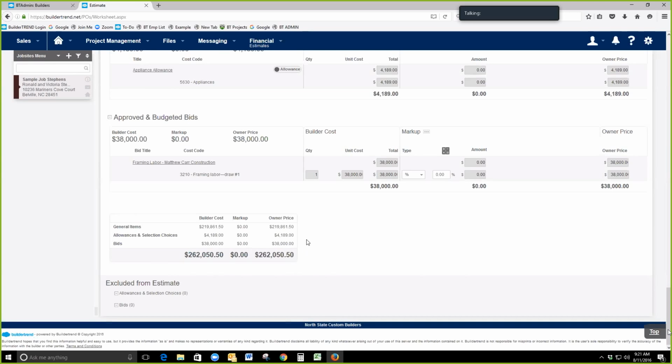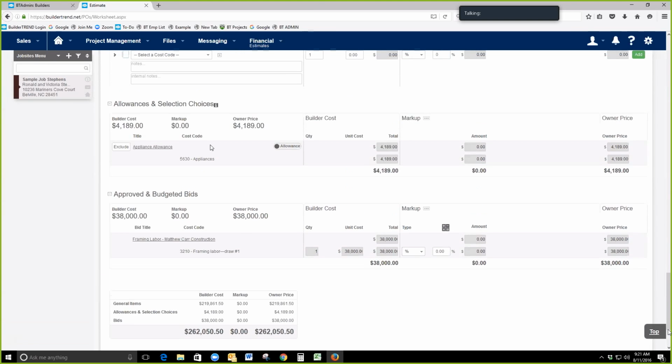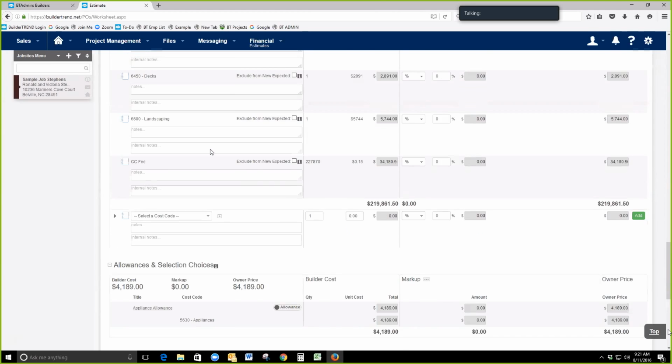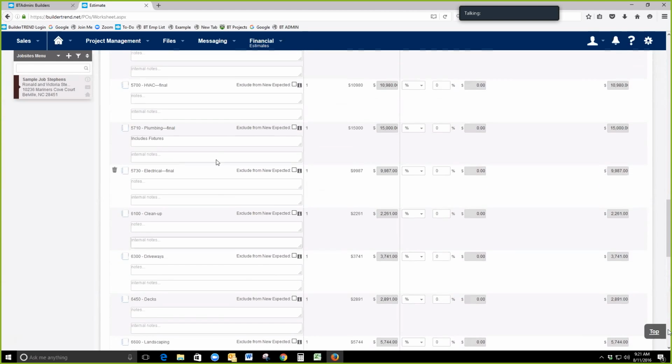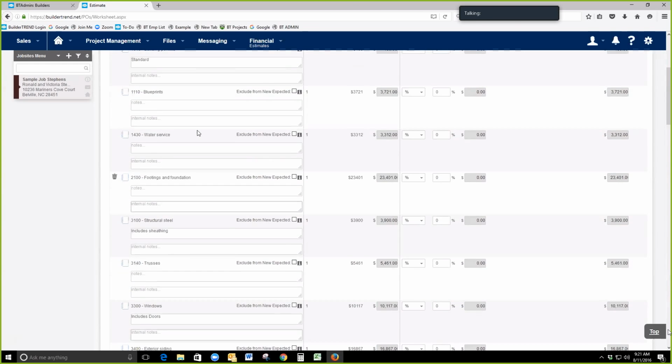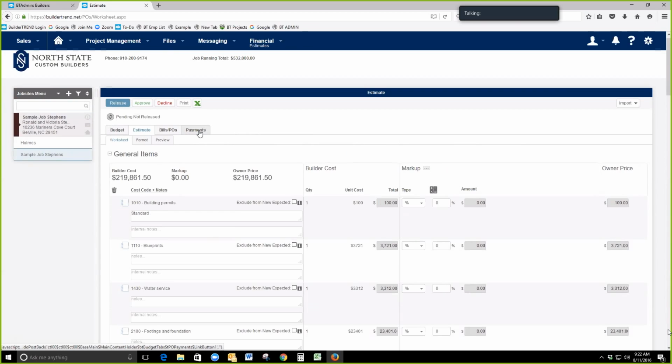Okay? So imagine, big picture here, we're working on an estimate for a client. We're getting rough numbers. That's pro forma estimating. We're using our knowledge of the market, our knowledge of how things have worked in previous projects, putting together a rough contract to get our client signed, and then we begin working towards getting our actual costs for a cost plus job, which we've done by putting in our allowances, putting in our actual bids so that we can get the most accurate price for what we're going to be charging our client, plus we include our fee. Questions so far? No, sir.